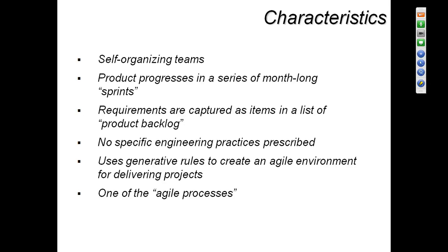Sprint planning is nothing but how many resources are available for this sprint and the exact hours they are available, and within those hours, how much work they are going to finish. How many backlog items, simply put.